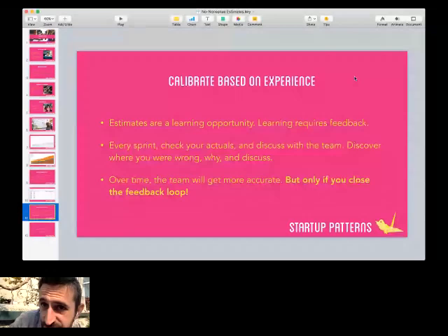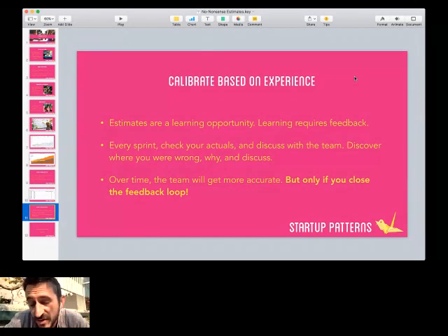So when we've surfaced, we had estimated last week that this would take 16 hours. It looks like it took 45. We do an investigation and we see, okay, well, that's because we got stuck at this wait state because there was an unexpected refactoring of such and such system, or we didn't realize that this required approval from legal, so we had to wait for them, and next time we should call them earlier in the process to make sure we get those approvals.